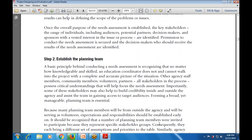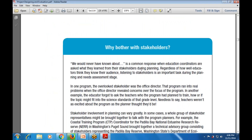Why bother with stakeholders? 'We could never have known about it' is a common response when education coordinators are asked what they learned from stakeholders during planning. Regardless of how education coordinators think about their audience, listening to stakeholder interests is an important task during the planning and need assessment stage. Overlookingstakeholders - such as an office director - can lead to real problems for the program.